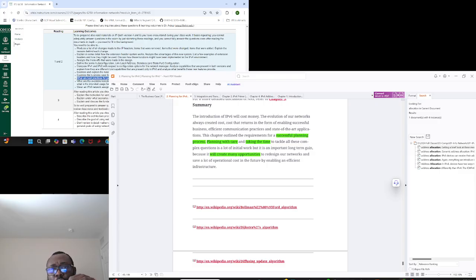There are automated tools. Almost every vendor has automated tools to prune the network. It's like a preventive maintenance tool. Huawei had it. I know Cisco has it. Juniper will have it, and the other vendors will have those kinds of tools. So you run the tools over your network in an approved maintenance window to get the current state of your network. If there are issues, such as some interfaces already failing or some routes being denied, you are purely doing a network audit at this stage. Do a network audit on your IPv4 infrastructure before you deploy IPv6.